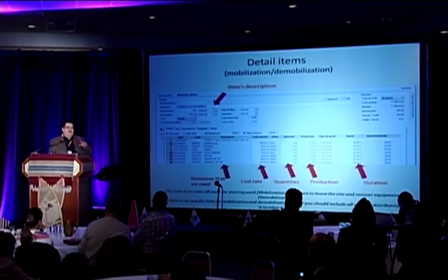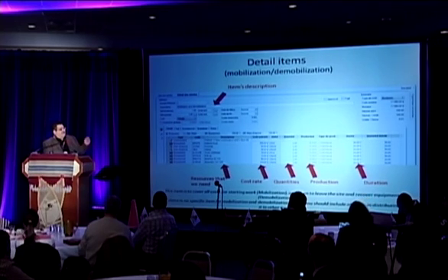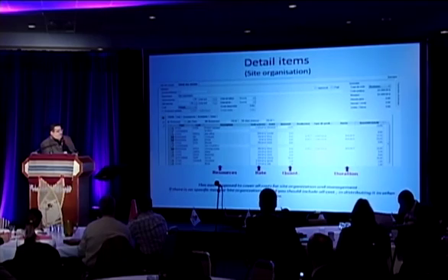The bordereau is your summary that you submit to your client that gives them the big lines for your contract, how you priced your job. If there's no specific line where they ask you to identify how much your mobilization and demobilization are going to cost, then you have to spread it out in your different items.